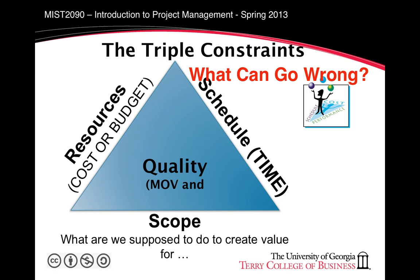Some common risks are related to scope. For example, scope grope — this occurs when a project team has difficulty defining the scope and deciding what the requirements are. Another difficulty related to scope is called scope creep, potentially one of the most common problems. Here we add features or capabilities incrementally that were not part of the original scope. This can be very dangerous to the project's success because new features generally require additional resources and more time.